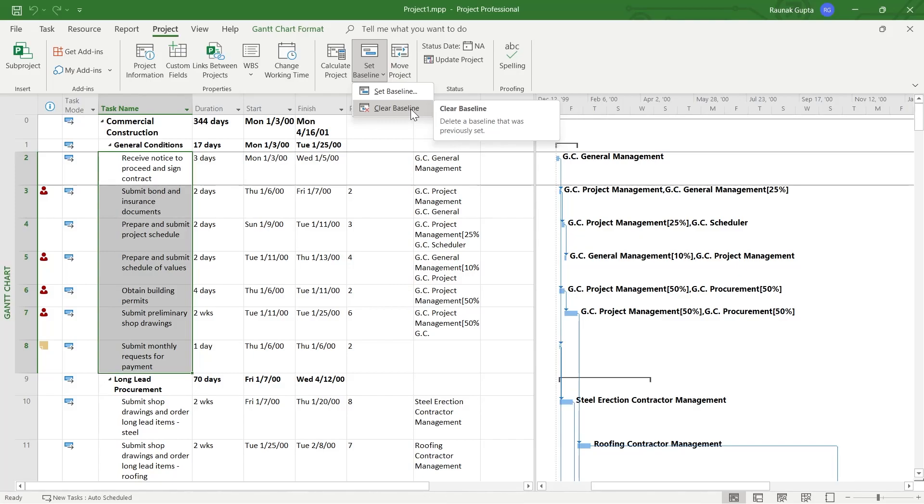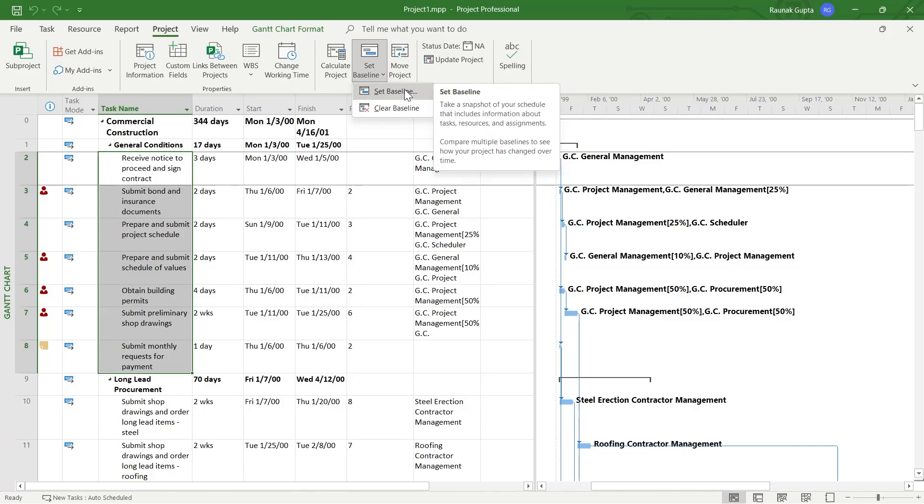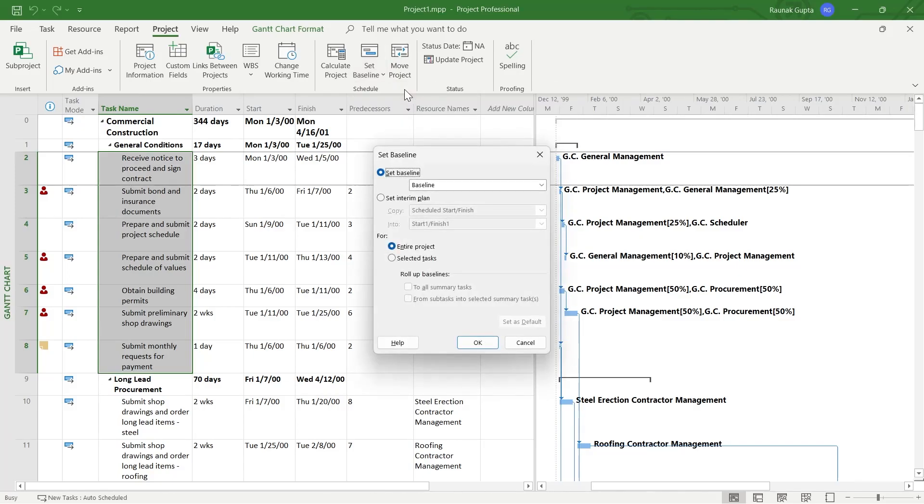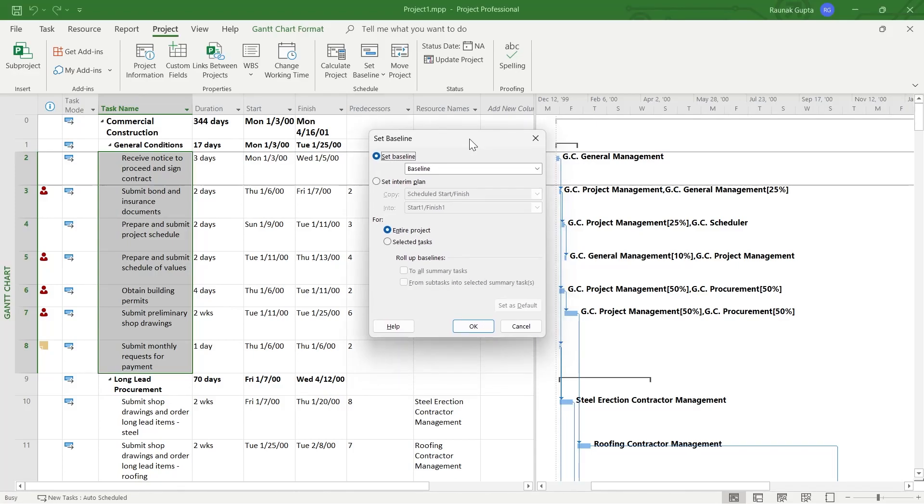So in order to create a baseline, you will have to simply click on set baseline. So click on this and you will see a prompt that will appear something like this.